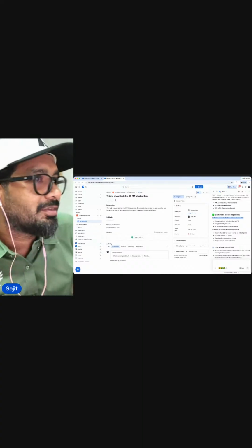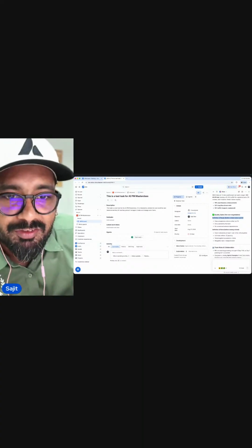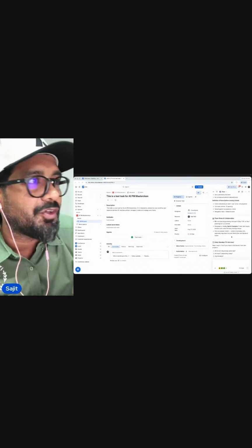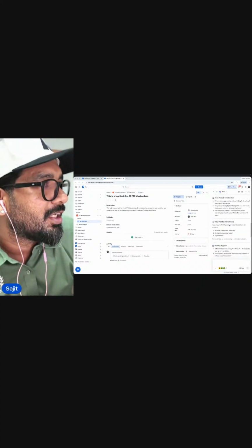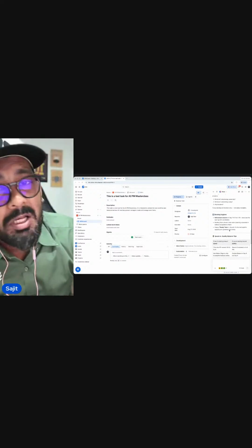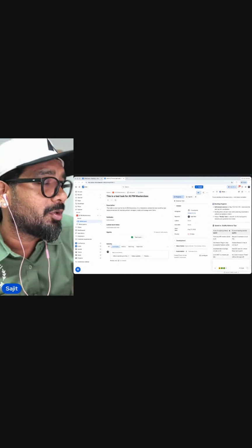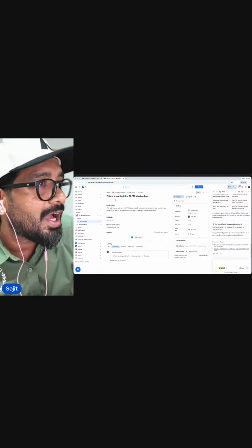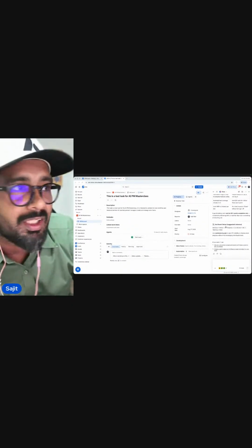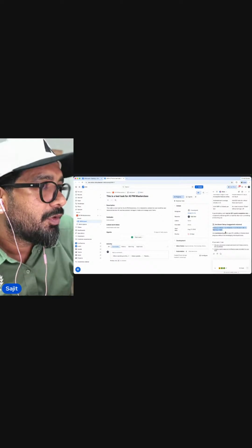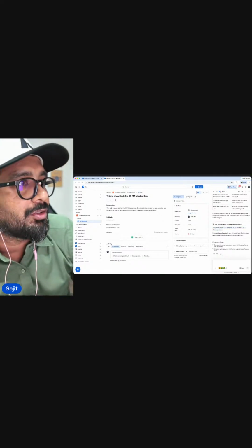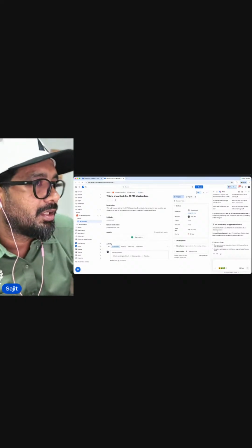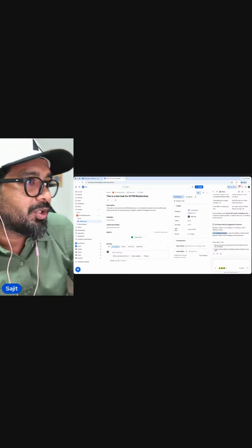All right. So it's giving you some parameters for your definition ready and definition of done. It's giving you a little bit of team collaboration ideas. It's telling you how you should do your daily sync up. Pretty elaborate. It's telling you a little bit about backlog hygiene, how you should do it. It's telling you speed and Kanban. And the bigger important thing is now suggesting a workflow. It's saying go from backlog to ready to in progress to in review or QA or testing and done. Use swim lanes by Epic to give PO visibility.